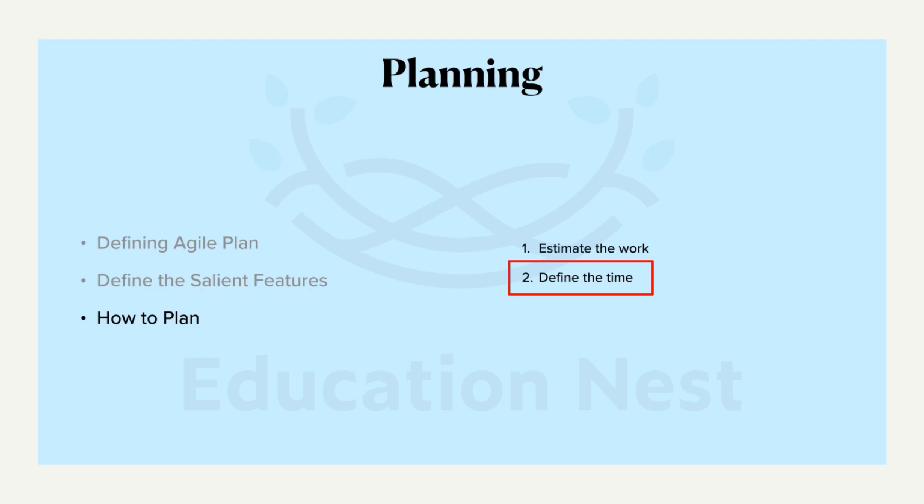So the main thing here is that if you define that time, if you block that particular time, your mind automatically sets itself that okay, I have to complete this activity, right? So it also happens in the opposite way. Consider a work can be done in 16 days, and then you have been given only 2 weeks of time. So your mind automatically starts to calculate itself. You might force yourself to work extra hours, and then you will automatically force yourself to finish the work in 14 days only. Or for example, all 14 days are not there. 2 weeks means 10 working days. So I think you get the point. So the people who tend to work a little longer, they work shorter, and the people who work very quick, they tend to work in a bit of leisure, right? But everything will be done within this time boxed frame only, right? So that's an advantage. All right, moving on.